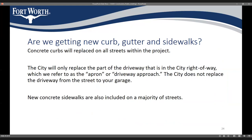All curbs on this project are being replaced or added if one did not exist in the first place. For existing driveways, the city will replace portions that are in the city right-of-way, and they will all be at minimum 11 feet wide or match what you currently have. Most streets are also getting new sidewalk on at least one side of the road, though there are a couple of exceptions where streets won't get sidewalk.